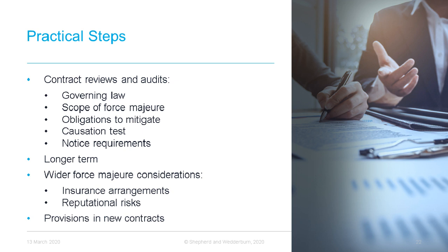As Matt mentioned, the notice requirements, particularly the point at which notice would need to be given, and also the longer-term consequences on the relationship, for example, if it would ultimately result in possible termination. And in particular, in the context of force majeure, consideration also needs to be given to whether declaring a force majeure event under a contract or receiving a force majeure claim from a counterparty impacts on your insurance arrangements. Also, whether there may be any wider reputational risks and potential damage to long-term supplier relationships if the force majeure clause is invoked.